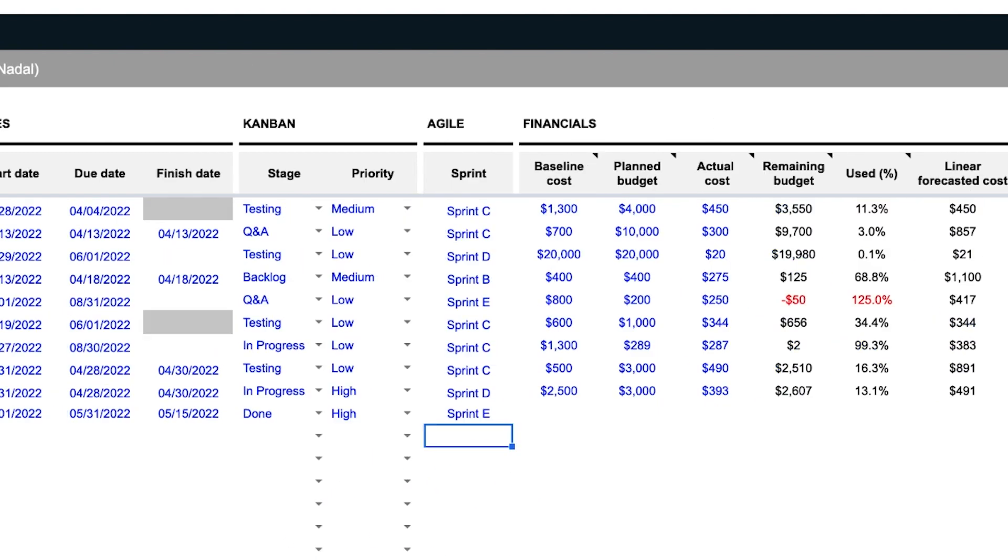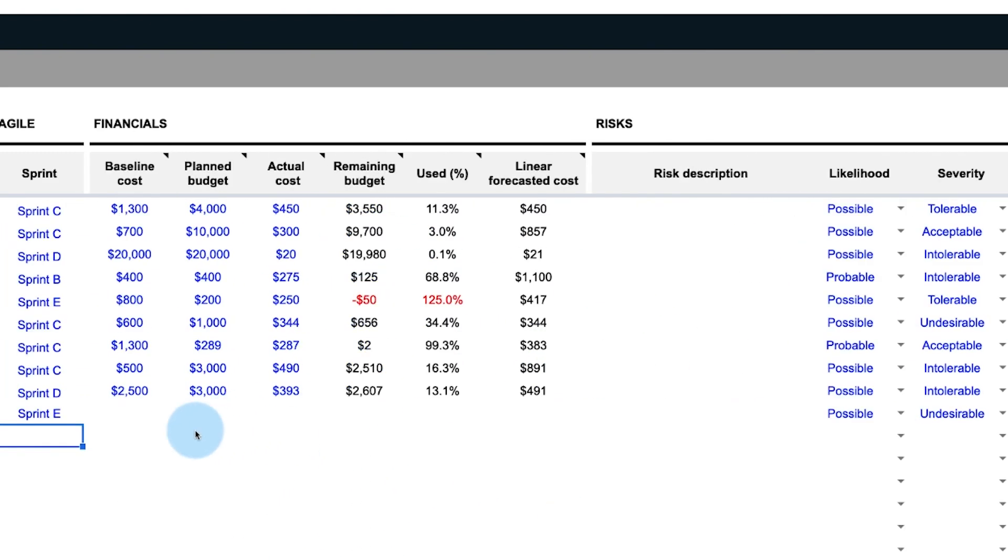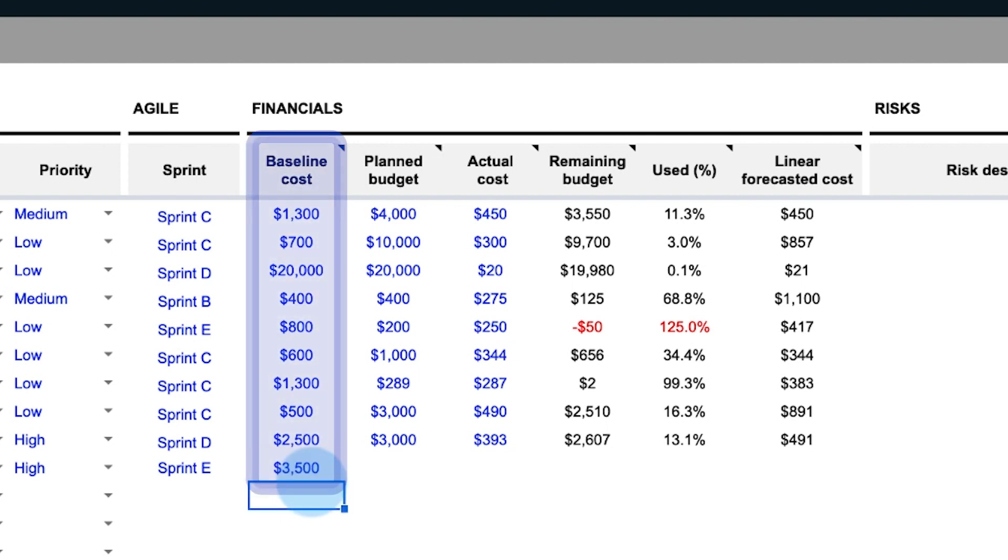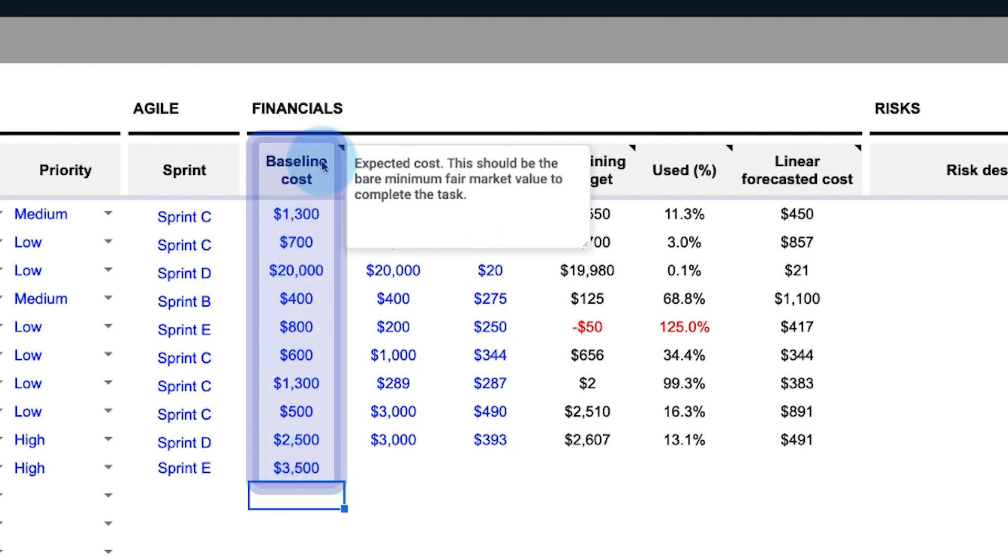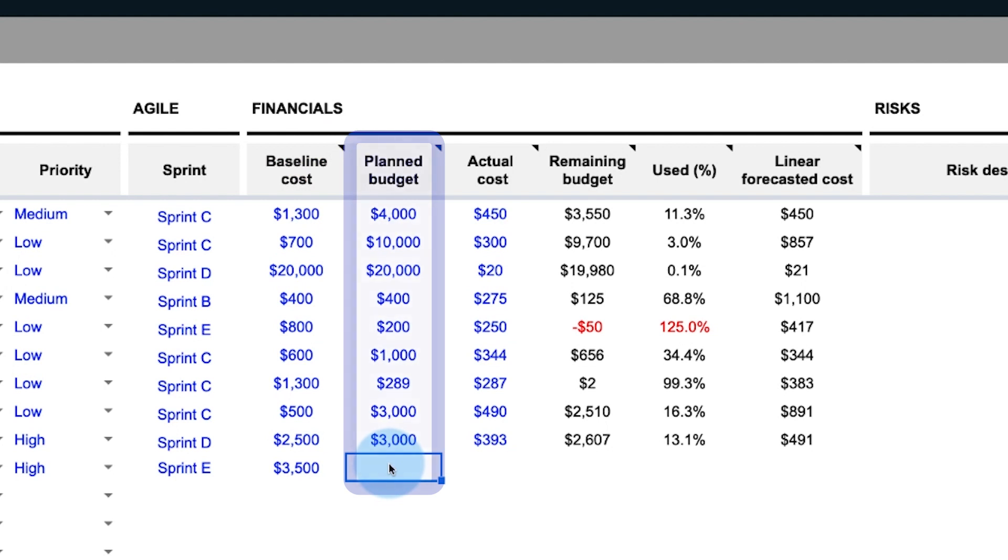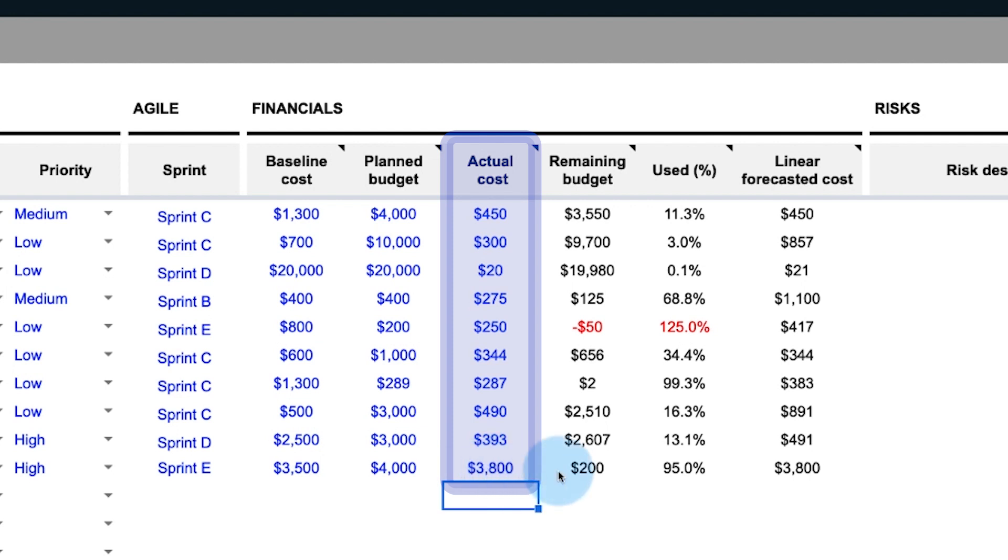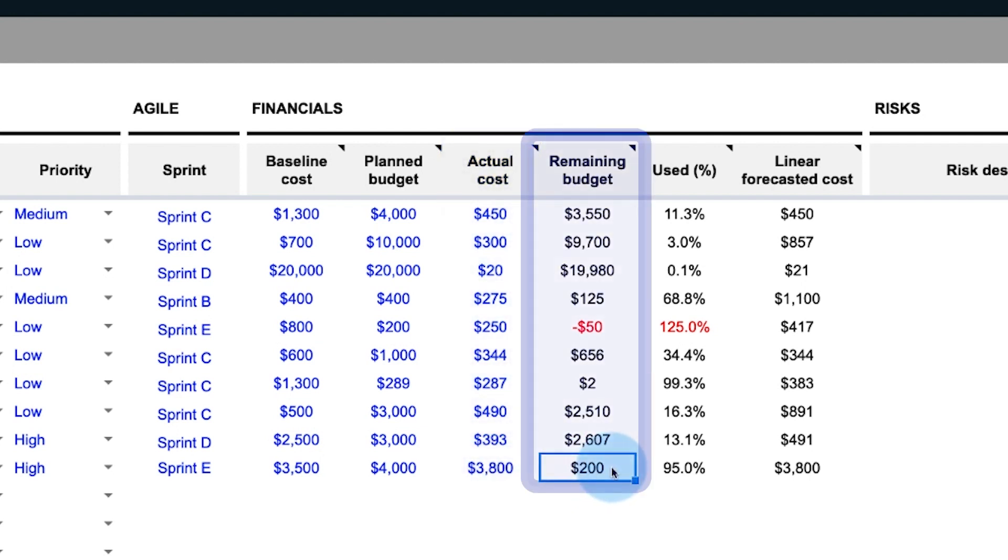Now, enter financials for each task. These include the baseline cost, which is the expected fair market value for the task, the planned budget, or the amount of money set aside for this task, the actual cost, or the amount of budget spent to date, and remaining budget.